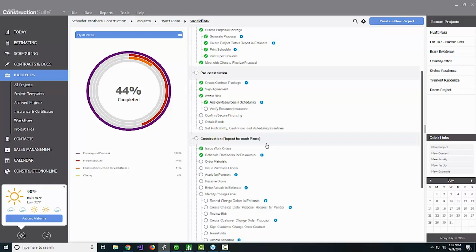There's going to be individual tasks that they're going to be working on that everybody doesn't necessarily need to know how to do, like maybe how they verify resource information is less important than the fact that it was verified. But that needs to be a step in here because, again, we do not, under any circumstances, want to risk having people out there climbing around on the roof if they don't have their own insurance. That might, as has happened for some of you in the past, cost up to $50,000, and that's a really quick and easy way to go upside down on a project.